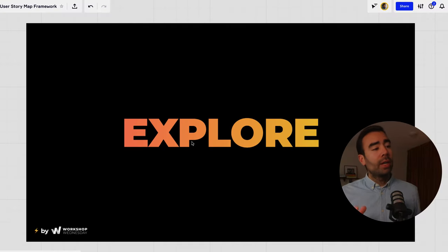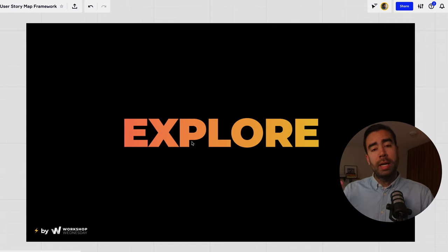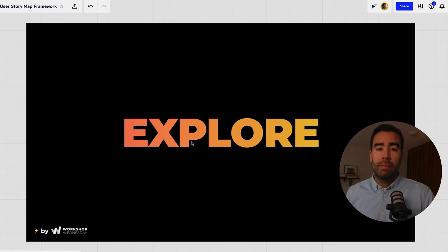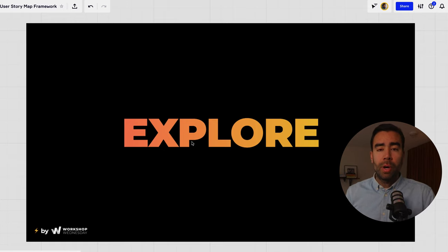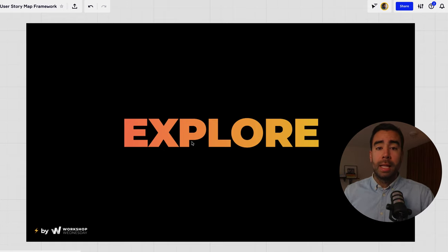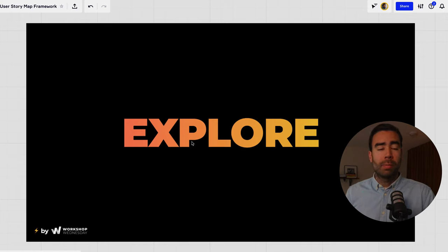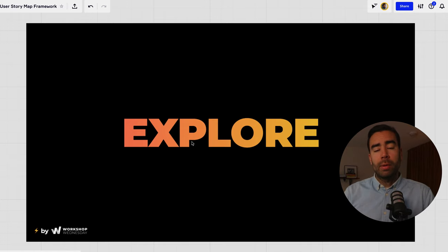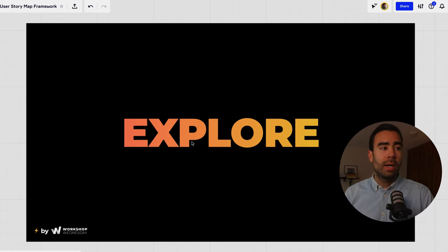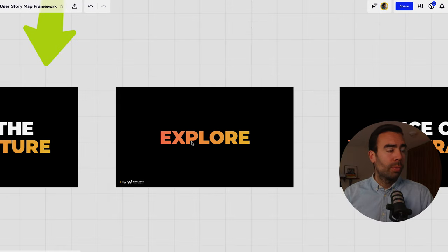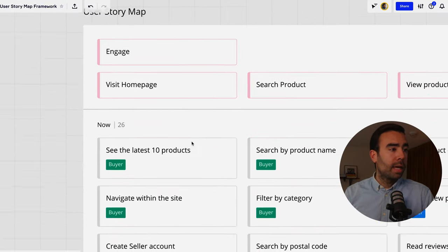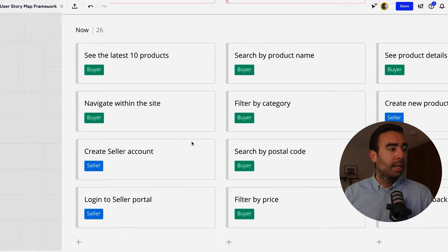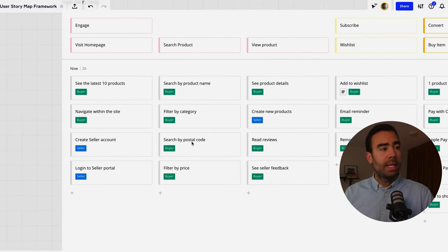And in step three you're going to explore the opportunities for the things that could be in your product so you can go wild over here but it is helpful if you have validated some of your assumptions first for example with a prototype of your product if you are not sure yet about a new product you want to launch then a good way is to create a prototype and to test it with customers get real feedback before actually building the product so I recommend doing that in this step explore the opportunities also so identify where your riskiest assumptions are and then move your ideas to the user story map.